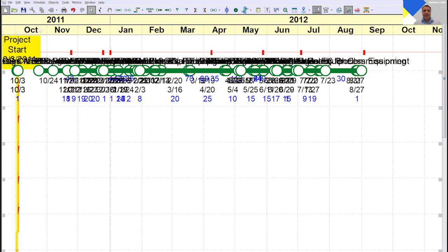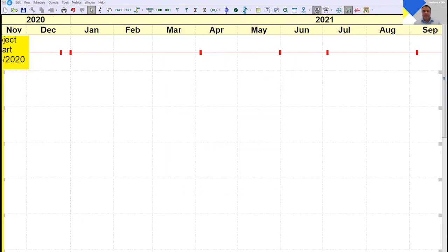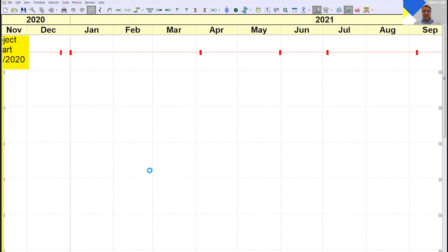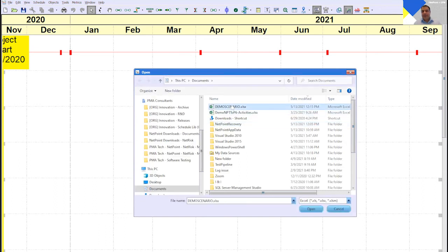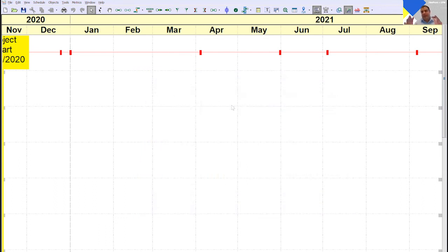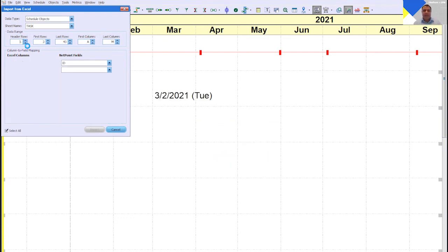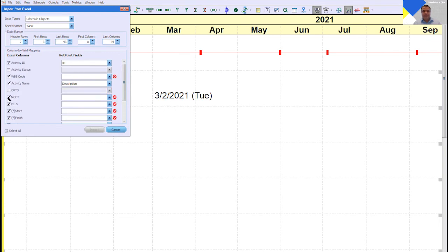So in this case, if I did a similar import, let's say for even this Excel file itself, but I just omit the grid positioning, then NetPoint will do a basic algorithm to lay it out. But again, it's not as thorough as Autograph, so you can do Layout Manager after you're done. And you can definitely do it that way. Autograph will lay out every activity for you, including the ones that you had on the grid, unless you lock them up.